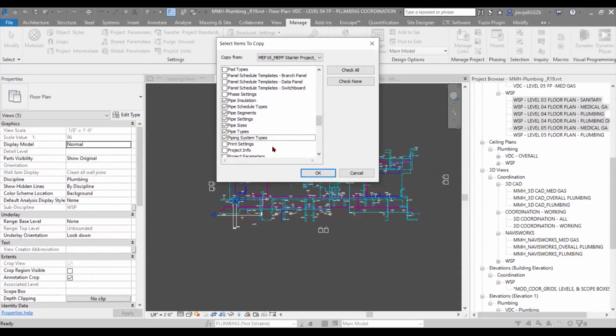Because on the contracting side of the world, one thing you've got to think about is we don't have a lot of time in order to get stuff to the field. Things are being installed as we speak. In some cases, we're hopefully 2 or 3 days ahead of installation while we're coordinating. But realistically, we're a couple of hours ahead.